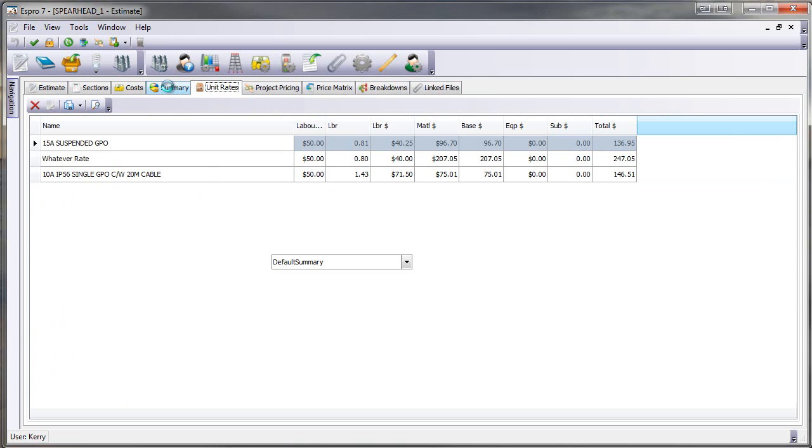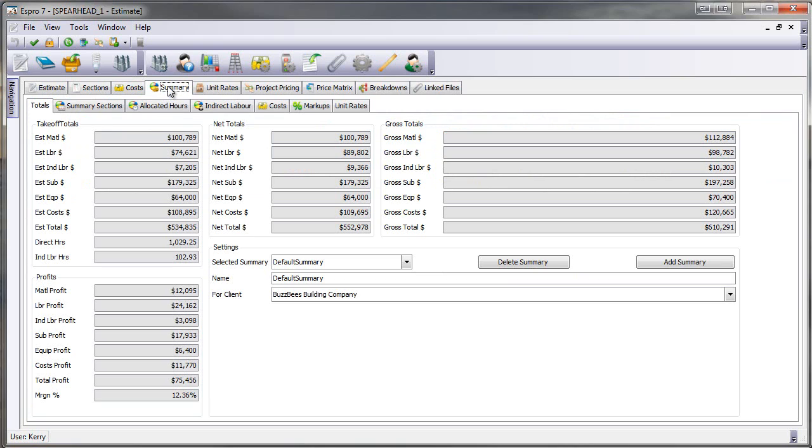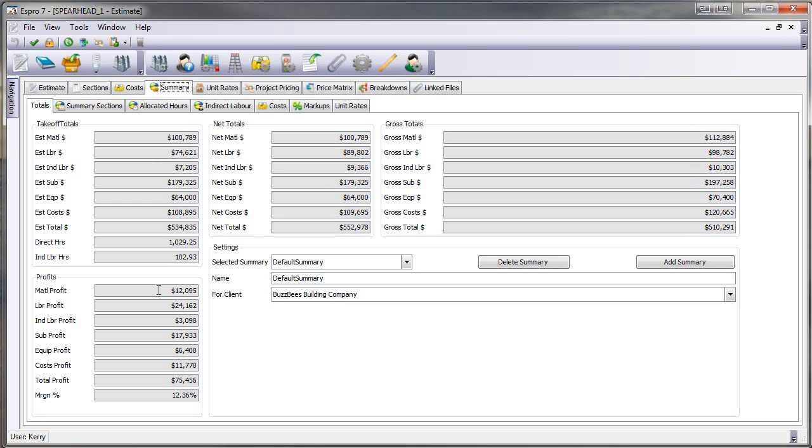Let's have a quick look at the new summary screen. So we click on summary. The first screen will show me all of my take-off totals. Here's all my costs to do the job. Here are my first mark-ups that I've made. If I've added gross mark-ups separately, here they are on this side. So this is my sell price. I can then come down and have a look at my profits that I'm making on my material, labour, sub-E, etc. And there's my margin for the estimate.